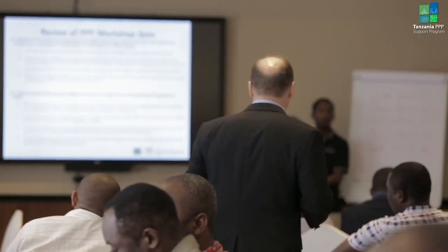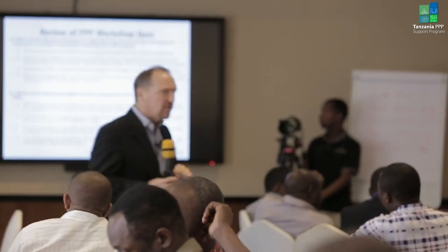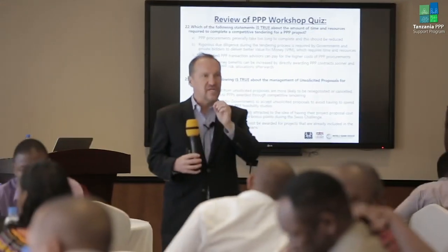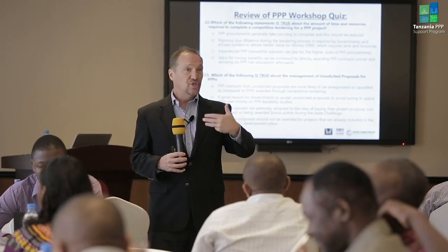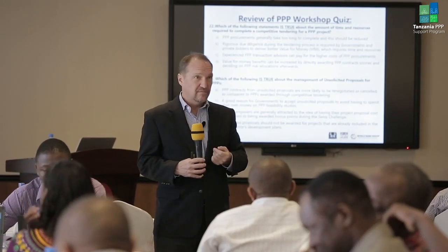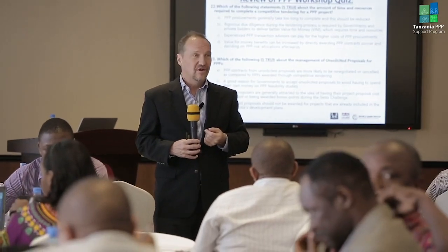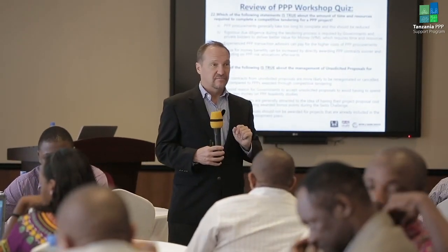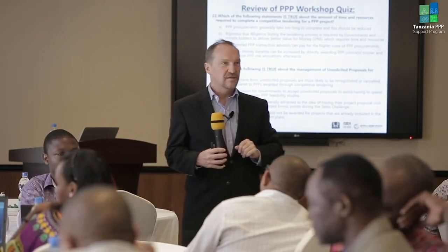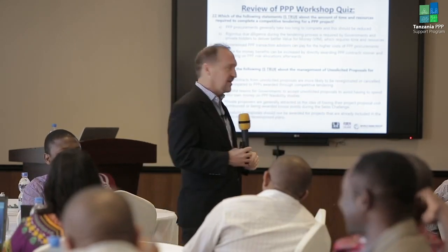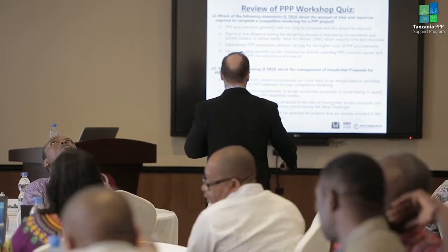Later on, you run into risks that occur, and we find that unsolicited proposals have a higher frequency of either being renegotiated, usually at the expense of the public sector, or even being canceled, oftentimes with charges of lack of transparency. There's something else going on that led to this award. It's not a fair deal.